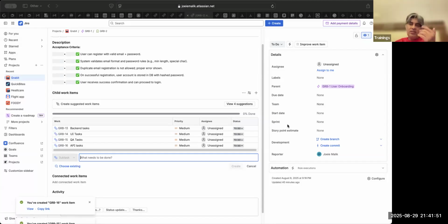So Priyanka said this is a 3-pointer. Initially she started with 2, now she is saying 3. Okay. So what do I do? So most people say 5. I also agree with 5. But whatever is the most popular opinion, we will not ask those people. We will ask people who are outliers. People who are either doing a less estimation or they are doing a more estimation. So Abhilasha, why do you say it is 8?